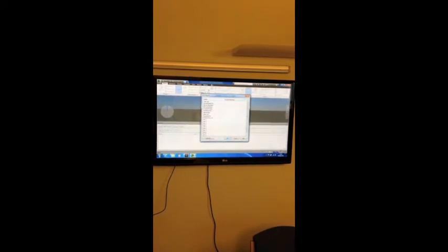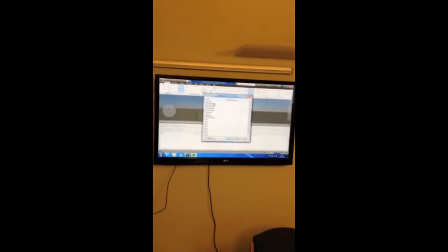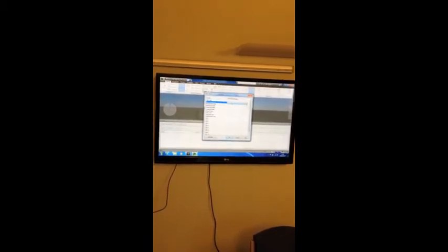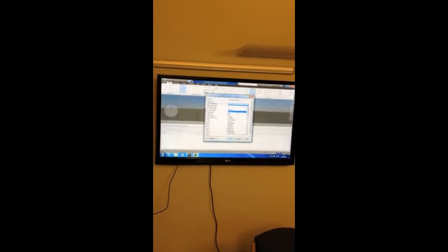And then this box comes up automatically, the field selector box. You need to click in the synchronization ID and change that to name, and then just click OK.